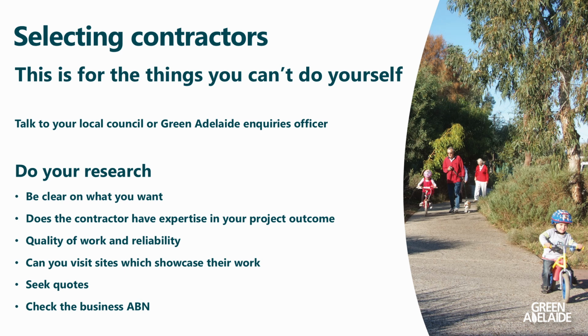Do a bit of research. Does this contractor have the expertise that you're looking for? Can you potentially visit any sites of their previous work? You can check, obviously, the quality of their work or their reliability. You might ask around, see if you know anyone else that has used that contractor. And you can also check up their ABN just to make sure that they're a legit company. There's a number of online tools such as ABN Lookup that you can use.